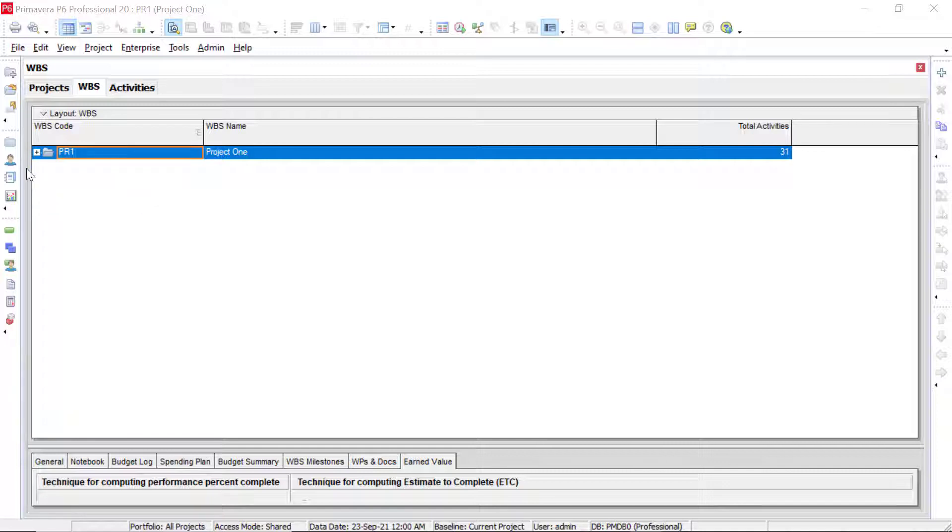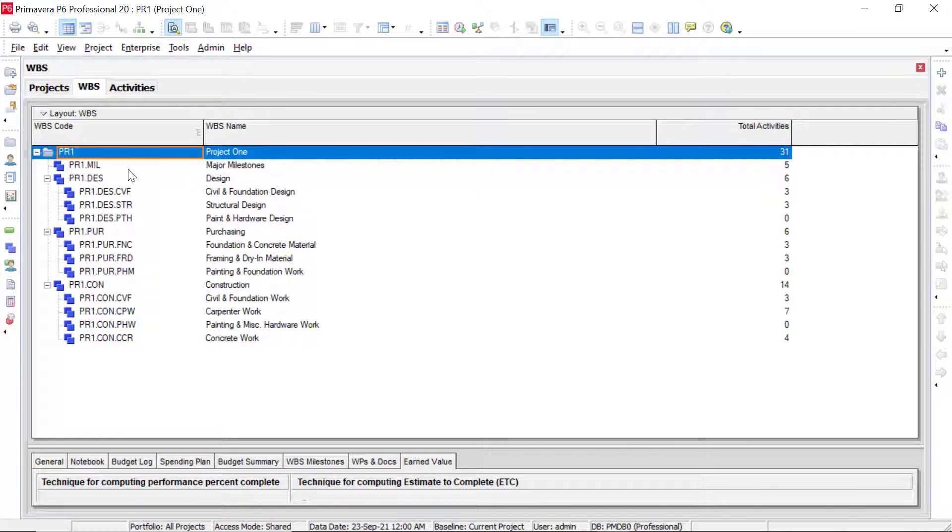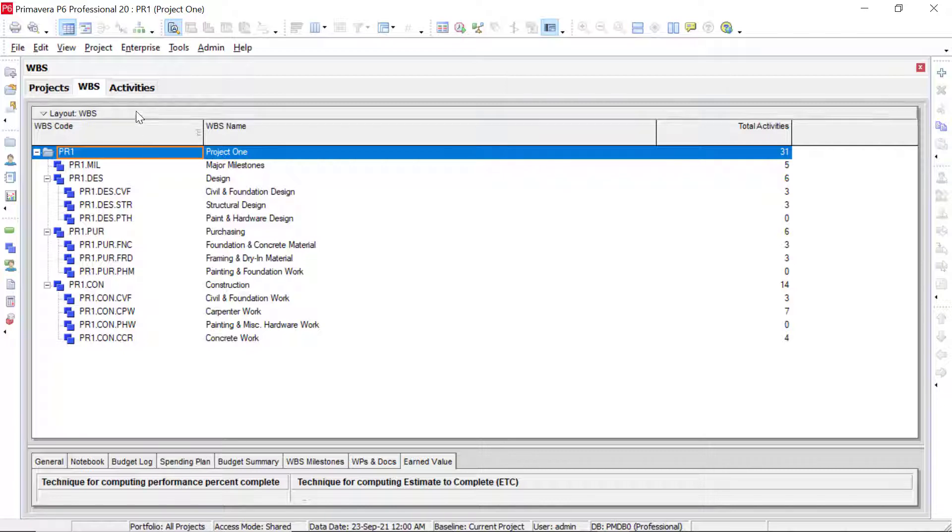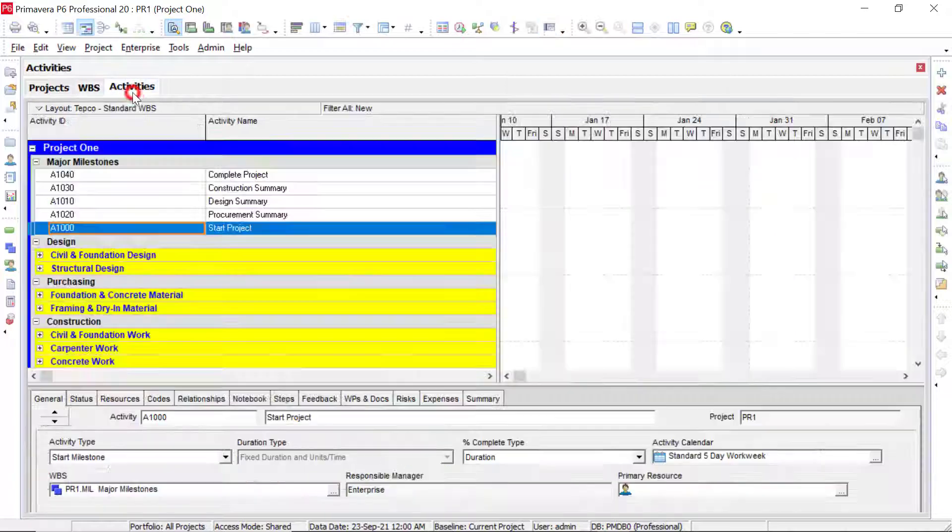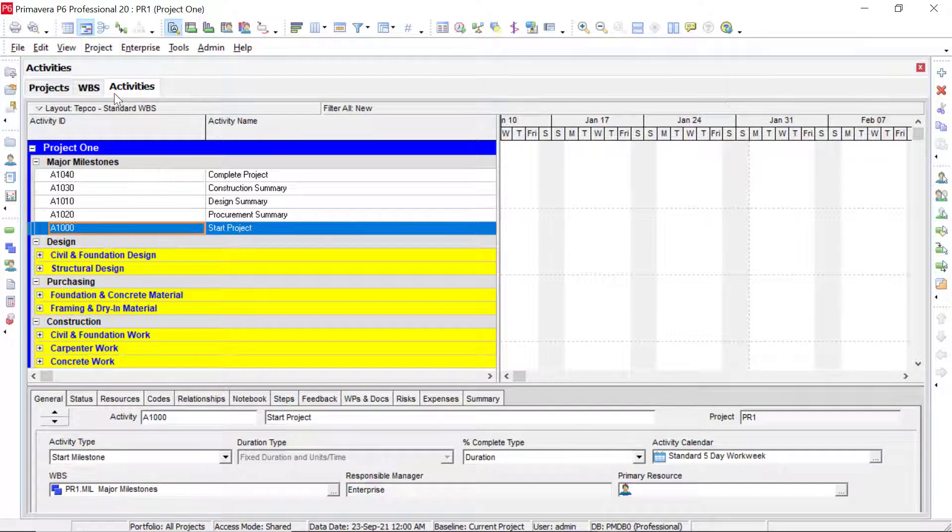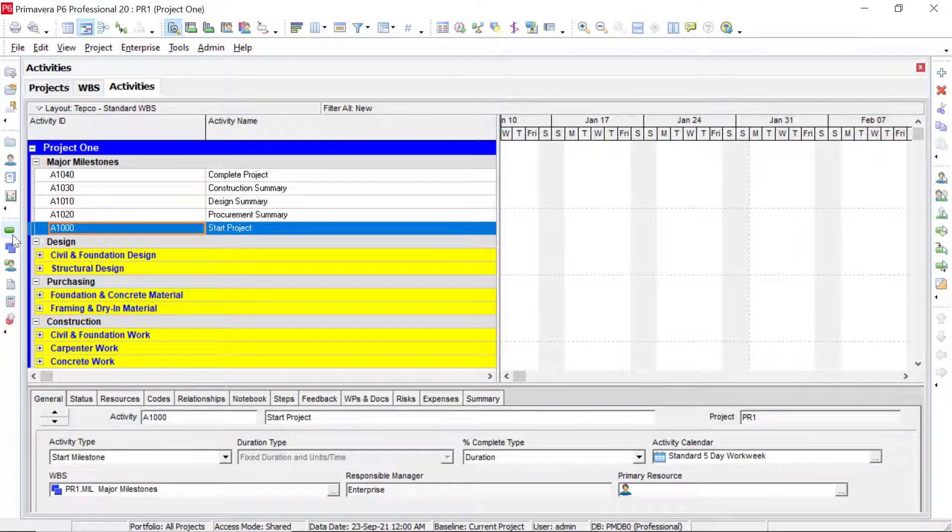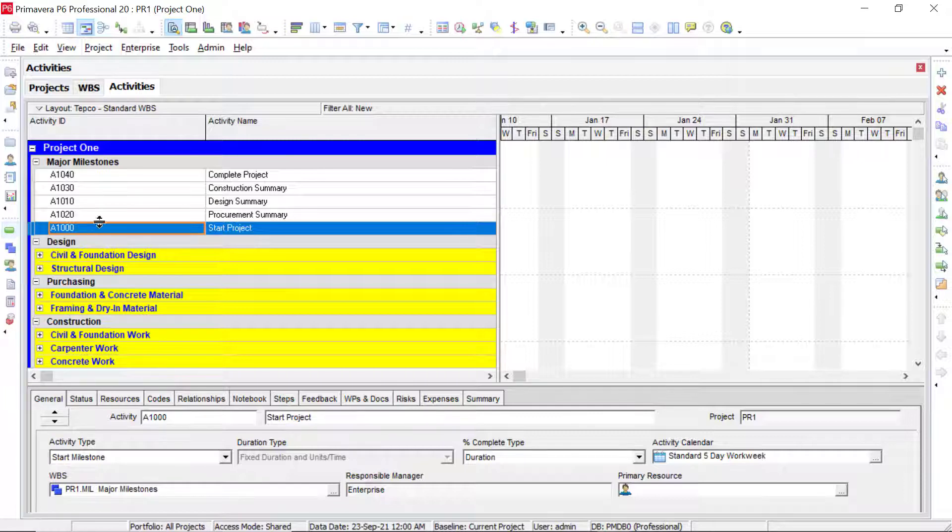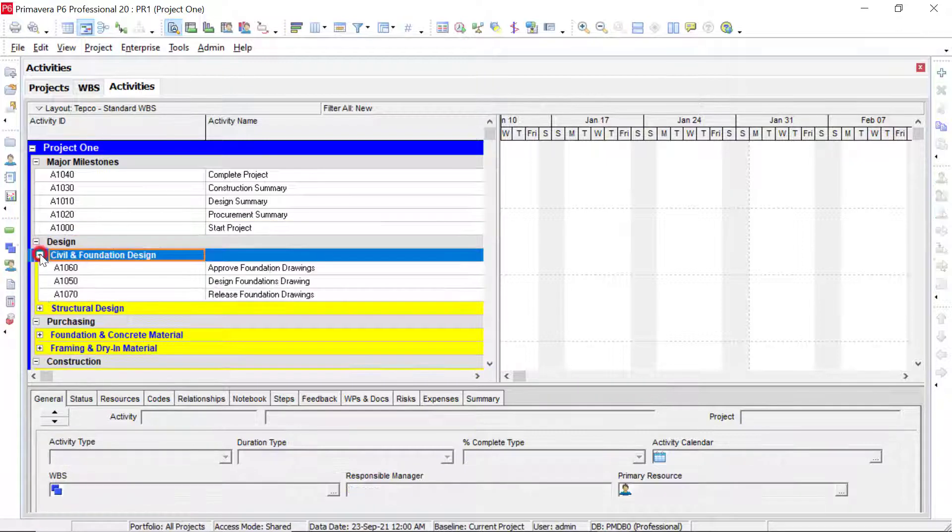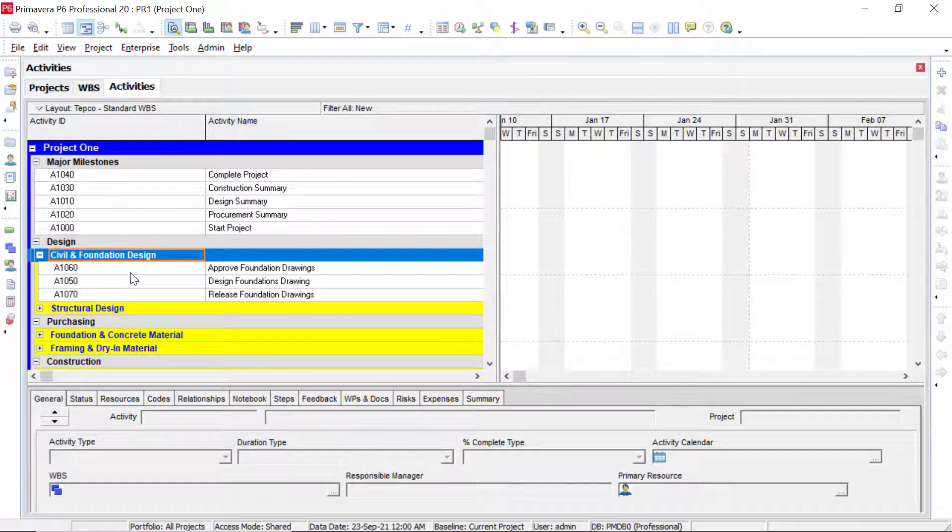If we click on the plus sign, then we can see all of the WBS elements that we have added currently to the project that we're in. Building out the WBS helps create a landing space for our activities to go. So if we switch over to our activity screen, which we can access by clicking on this little icon here, we can see these WBS elements that we've added, and we can see the activities underneath each one.